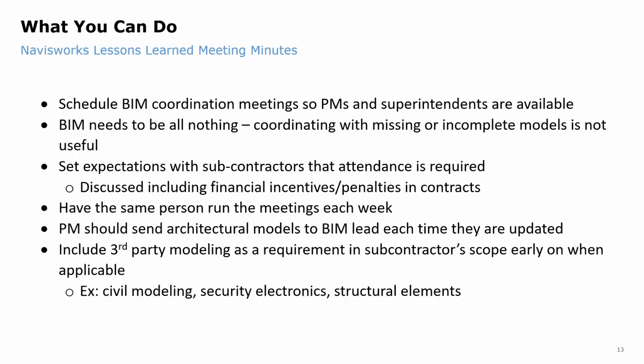There were jobs in the past that were coordinated with mechanical and electrical, but not plumbing. And the model looked really nice, and then plumbing came in and just busted through everything. We were like, well, there was no point in having these coordination meetings or modeling. So that was the biggest takeaway from that.